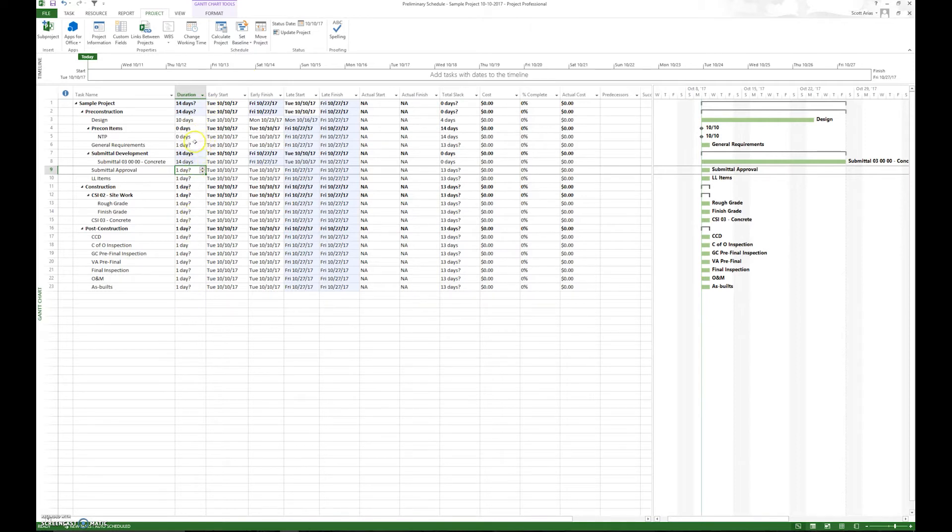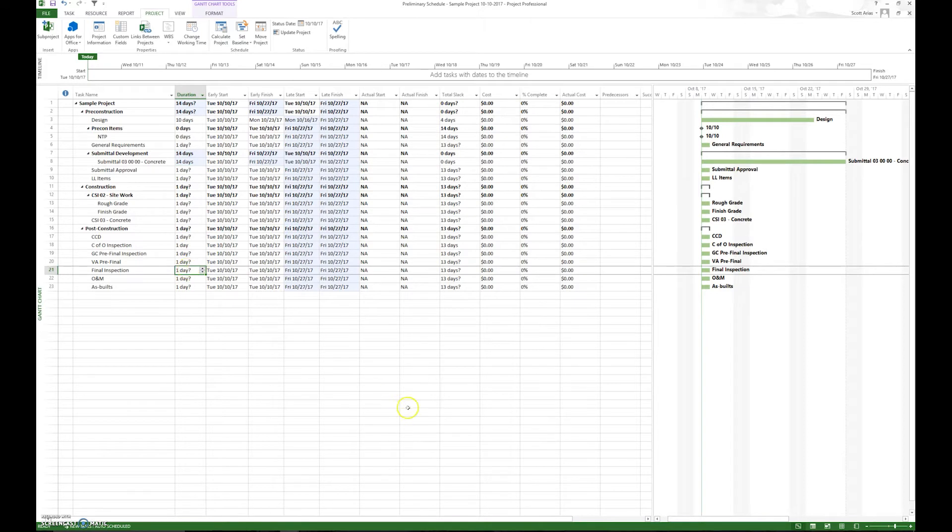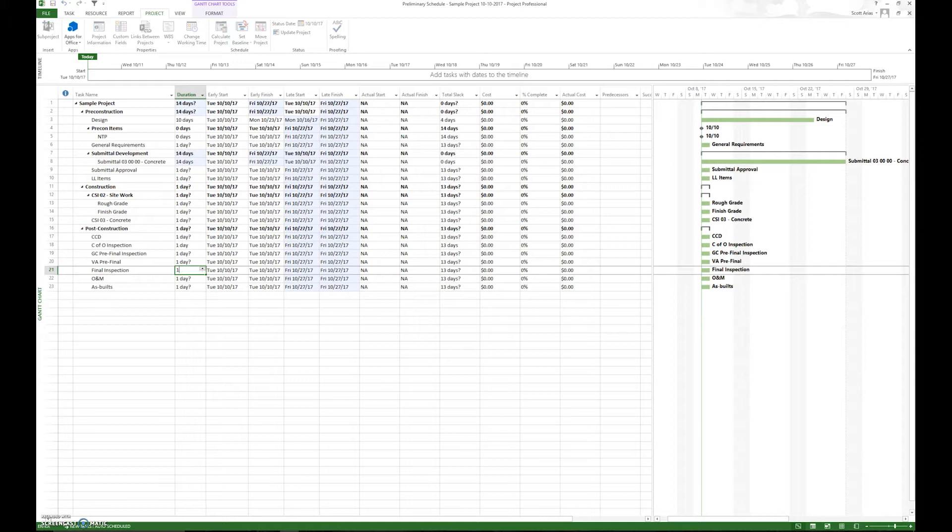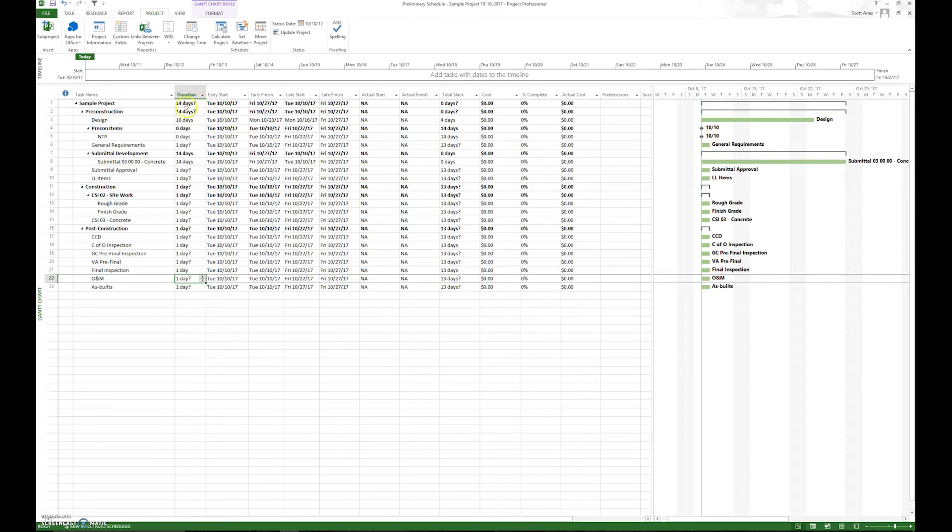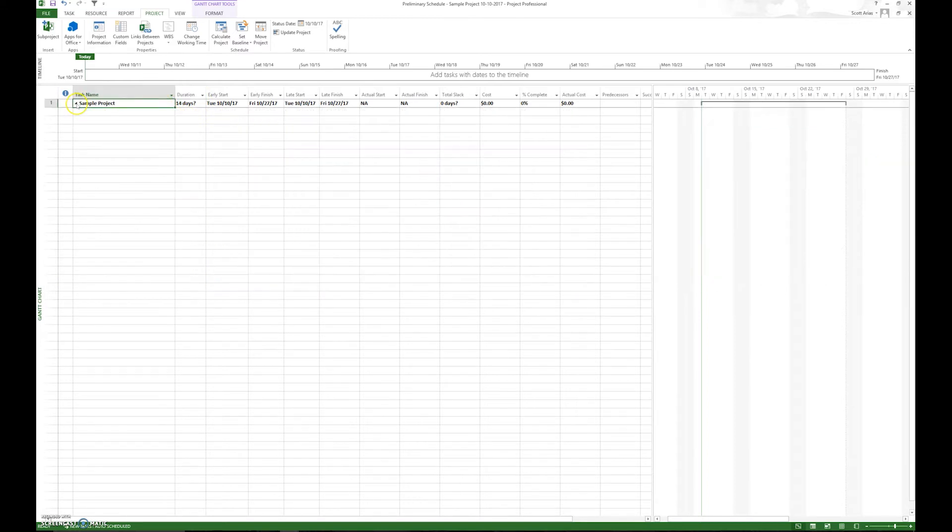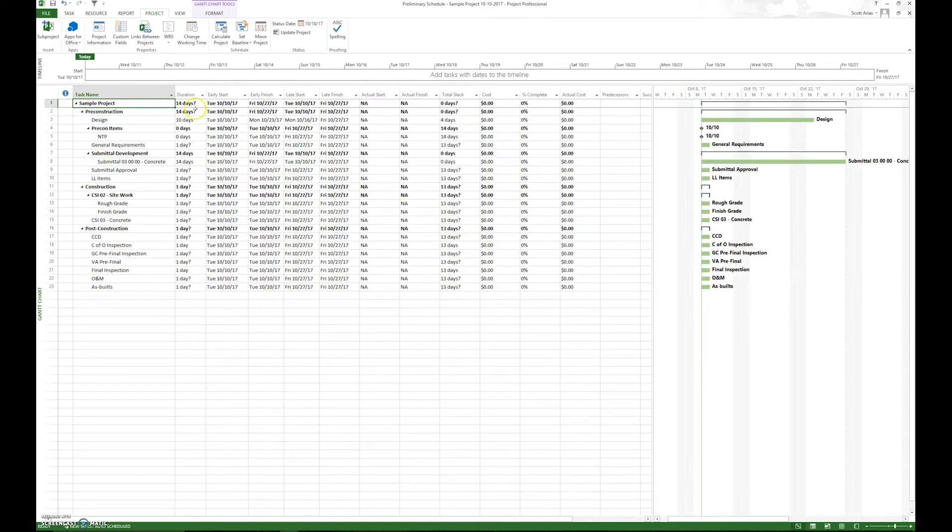One of my biggest pet peeves is when something is a one-day activity, say final inspection. Maybe it may be one day, but they'll leave the question mark there. And what the question mark means, it means an estimate. So what we want to do is even though it says one day, we still want to hit one and hit enter and it gets rid of that question mark. We should never have any question marks at the top, at the project level, project level summary task. Cause if we do, we know we have a question mark somewhere down here.